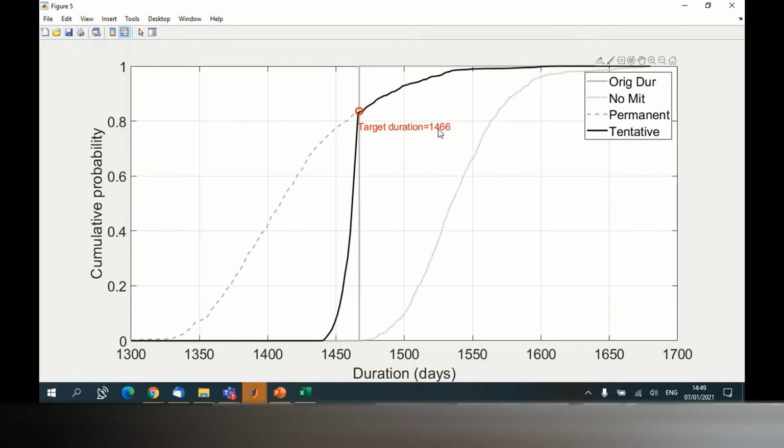So we are focusing on this number. So we just start increasing our probability just before this number. You can see this sudden shift. Well, if you apply all of your measures, then you are going to have higher probabilities at lower durations, which is really unnecessary because you don't need that benefit and you are going to pay for something that you don't need. All right, guys.